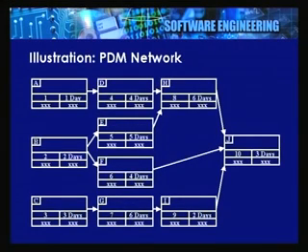So, now look at the slide again, you see an example of a PDM network. Okay. So, PDM network basically is going to have all the activities in the boxes, with the starting times, finishing times and other description there, and the sequencing is determined by the arrows.